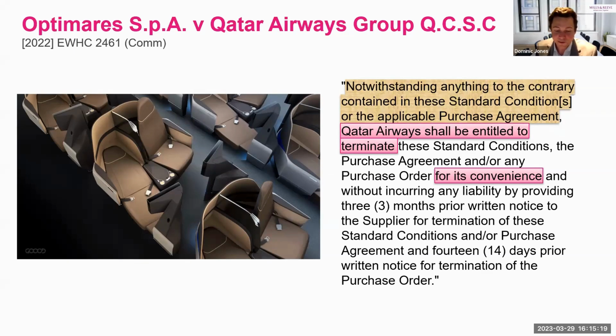The court also commented that the good faith clause on its terms related to the performance of the parties' responsibilities and obligations, and noted that the right to terminate was neither a responsibility nor an obligation, so it didn't fall squarely within the parameters of the good faith provision.